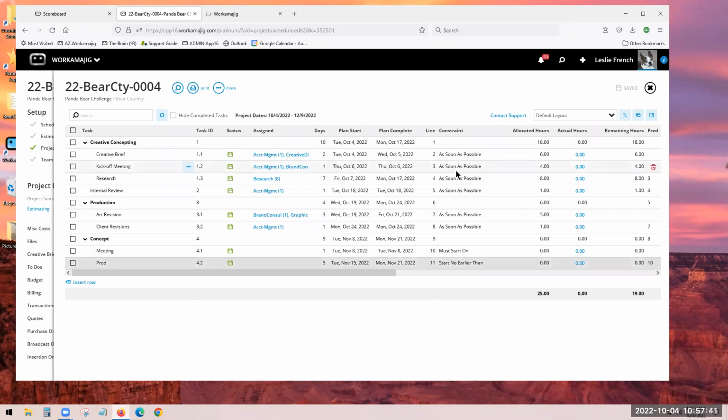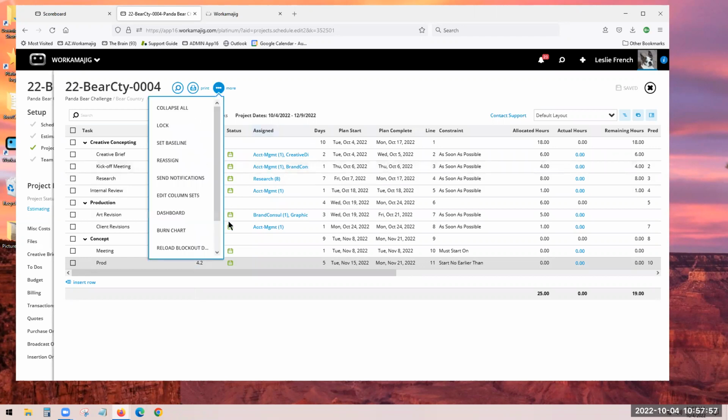If you're fixing a constraint on every single task, you're trying to work the system, and you're welcome to do it, but let the magic work for you by working on the day's duration of what you expect the project will take. And I'm going to also give you a secret. If you've got a great looking schedule, maybe I still need to schedule a few people or services, but I know the schedule is what I want, and we're way ahead of schedule, and I'm happy.